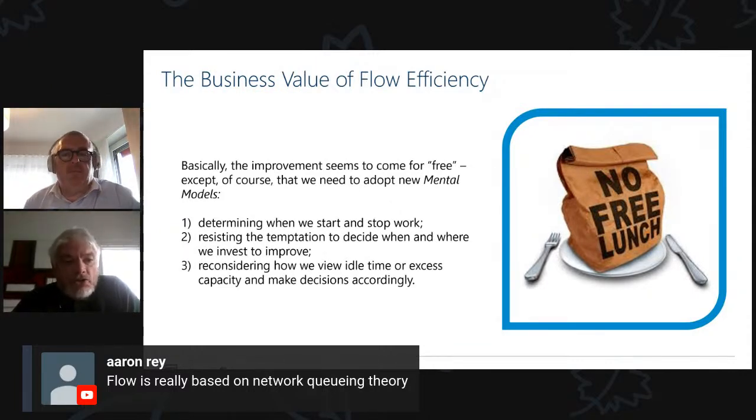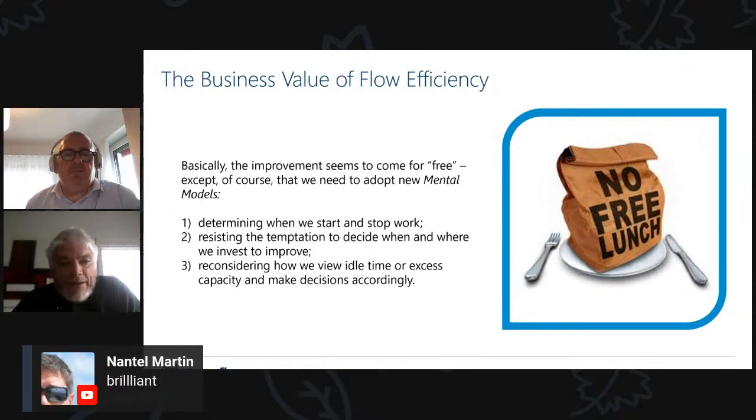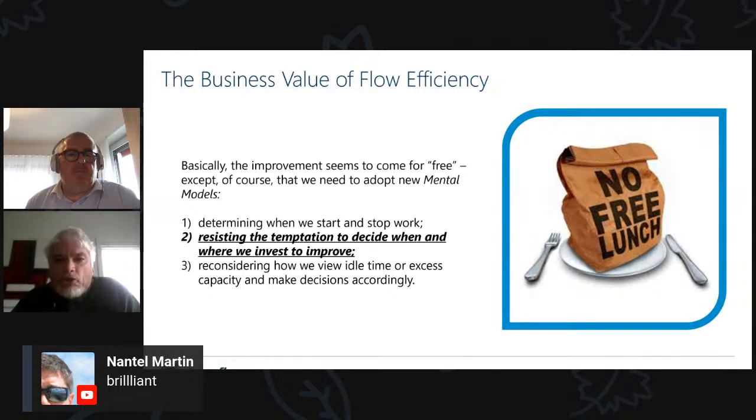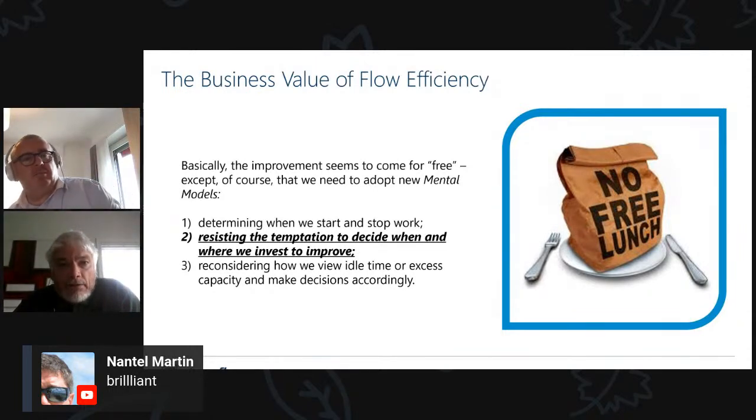And reconsidering also how we view idle time or excess capacity and make decisions accordingly. And again, please resist the temptation to be smart and to decide when and where you invest money to improve your touch time. Your touch time is only 5% of your flow efficiency. If you've got money to spare, do it. But you're going to spend a lot of money and a lot of time to improve only 5% of your flow efficiency. It's not smart.